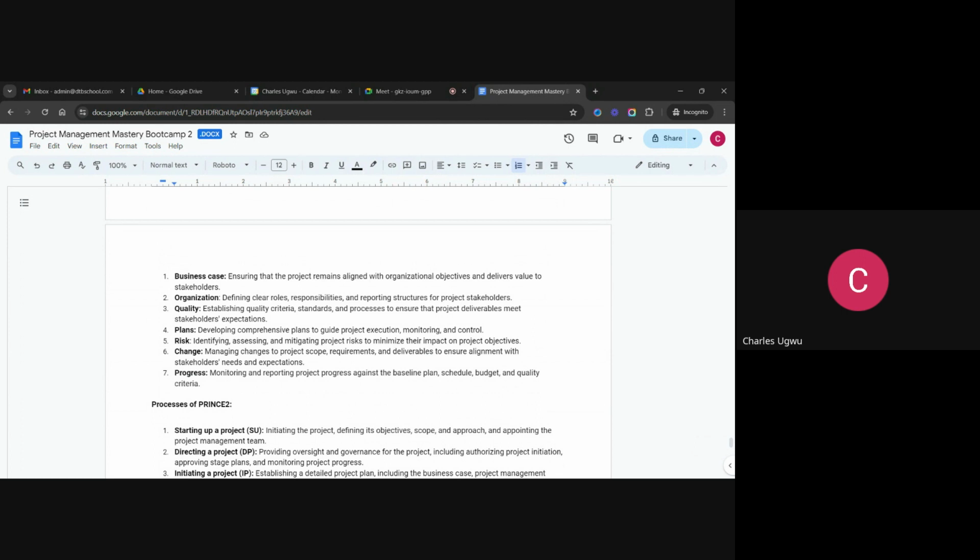And if you know how to use all these project management software, when you are creating a project plan, you have a baseline. Before you can start any project, you must baseline your budget, your timeline, so that if there is a change, then you need to create a different baseline.